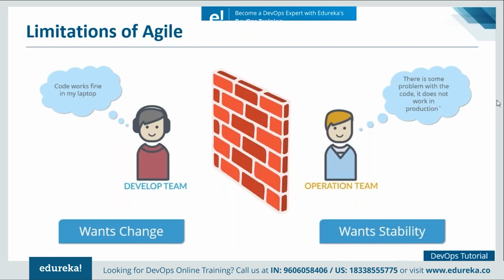And there's a question popped on my screen. What types of projects are good for agile methodology and what types of projects are good for waterfall model? So this question is actually from Dave, and it's a very interesting question. So let me tell you, when I talk about waterfall model, it is suitable for the projects where requirements are not at a moderate to high risk of changing, right? The requirements are pretty static. So that is suitable for waterfall model. When you talk about agile, when your application is at a moderate risk of changing, then you can go ahead and use agile methodology as well. So I hope this answers your question, Dave.